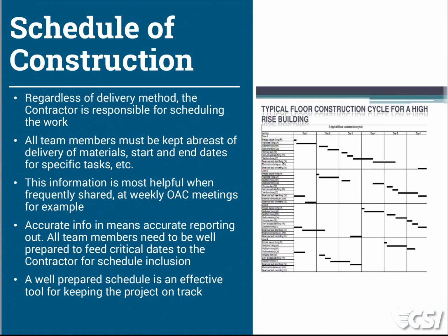Depending on the type of project, you may work on projects where look-ahead schedules are used, where perhaps the next week is planned out before you get together and talk about the schedule again, or perhaps a month ahead. So these are tools that help plan those activities for the contractor and certainly inform us for perhaps submittals, shop drawings, critical involvement that we have with answers or responses to questions.